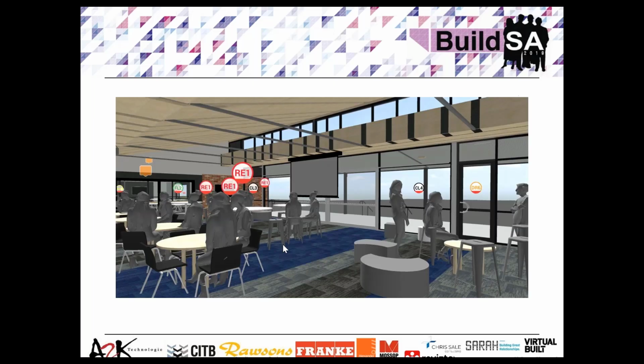Now, the issue is this: we use Revizto a lot as a tool in the office, and we're using it more and more, and we're now getting contractors to get into there as well. A while ago, we took Revizto from the design and coordination phase into the construction phase. So I've used it on site with builders; it doesn't quite replace RFIs, but it helps manage that process. And we do a lot of regional work too, so we can talk online through Revizto, and they can discuss ideas and that kind of stuff. But now we use it for defects management, and now we're also using it for some facilities management as well.